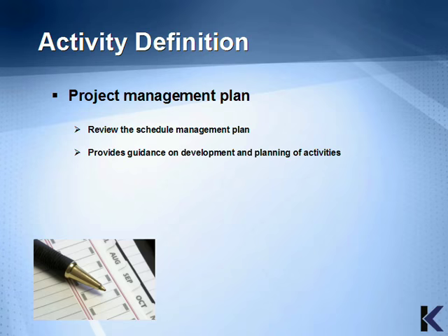If there is a schedule management plan in the project management plan, it should be reviewed because it might provide guidance on development and planning of activities. If there is not one, one will need to be developed in this process and added to the project management plan.